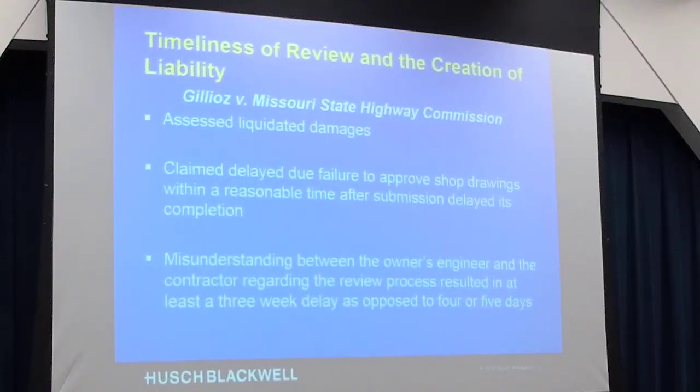Timeliness of review, this is a Missouri Court of Appeals case. I'm not going to spend a whole lot of time on it because it's not particularly exciting, but it does make the point that if the shop drawings or submittals aren't approved either according to the schedule in the contract or in a reasonable time, that's a lawyer's favorite term, well, that was a reasonable period of time, that can delay the performance, and if it results in a delay the contractor can get additional delay damages, extended overhead, standby, that kind of thing.